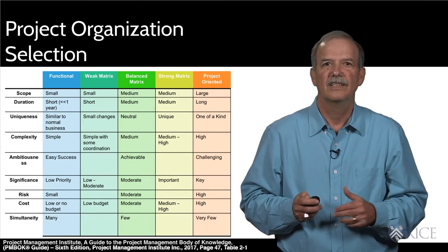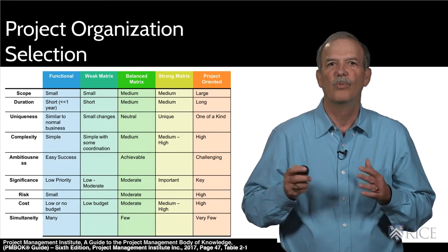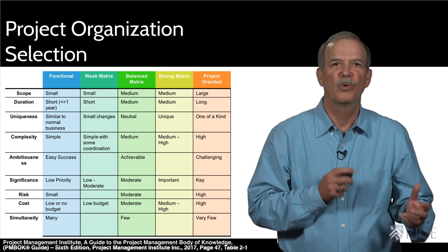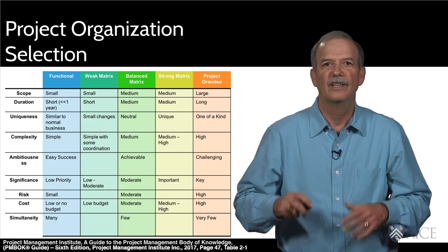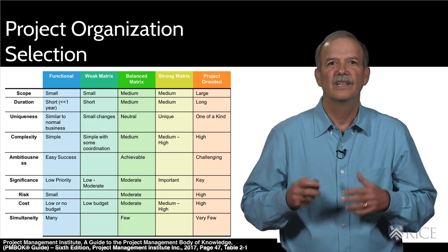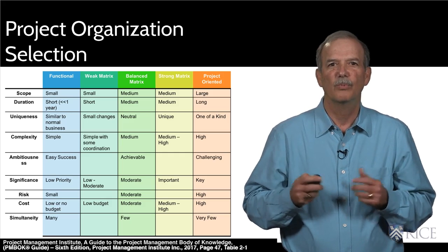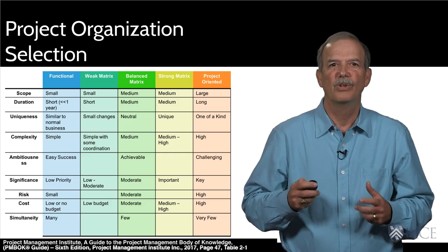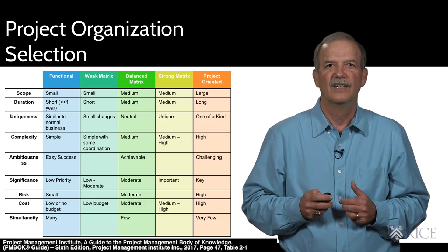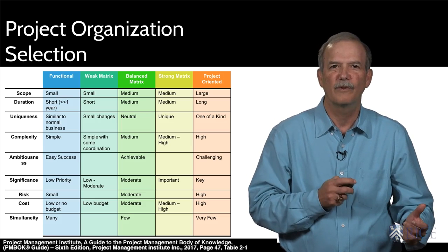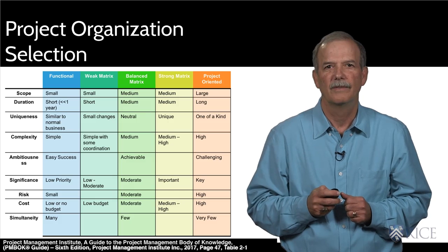In summary, as the projects grow in size, duration, and complexity, as they become more unique and strategically more important to the organization, as they increase in risk and cost, then the more complex project organizations make sense. As more of these situations occur, the more we should move toward a stronger project manager organization structure. The more we should move from a purely functional approach toward a purely project-based approach.